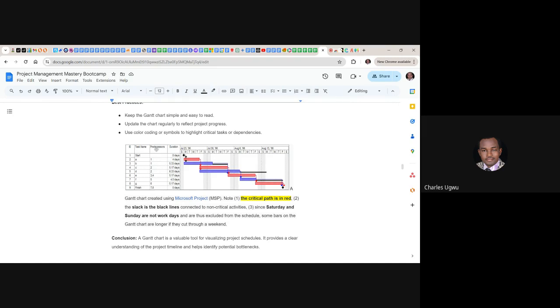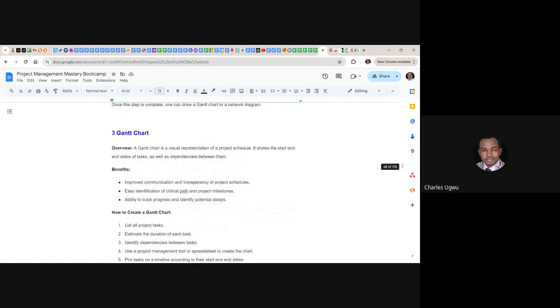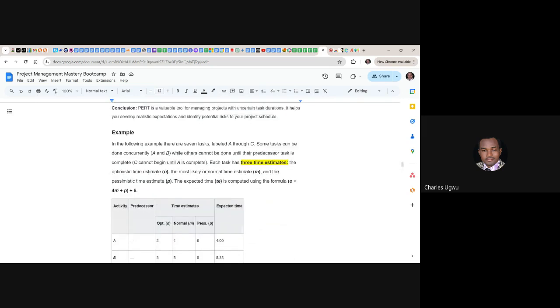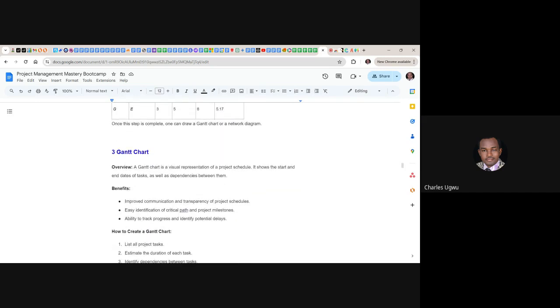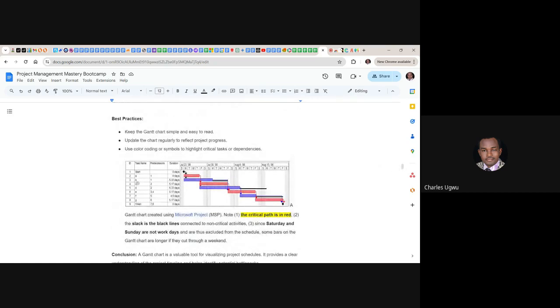And again here, once you have created the predecessor, now you put the duration. Now here, you can see we are utilizing everything we've captured in this PERT analysis, in this PERT document, in this software. We've created a task, we've put the predecessor, and now we're putting the duration. We captured it using the PERT method. You see all the durations we captured. Now we said 4 days. When you say 4 days, you see the start day here. You need to state the start day. Once you state the start day, 4 working days is going to be Monday to Thursday.